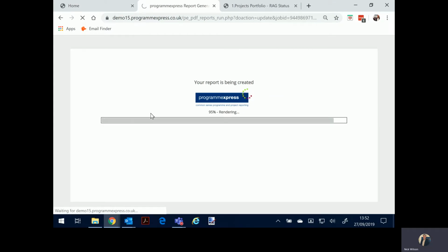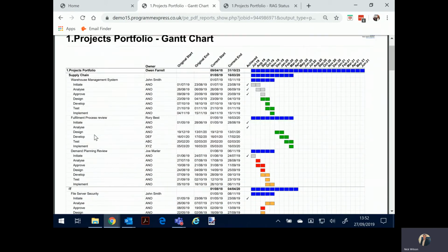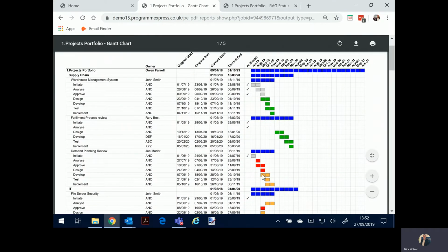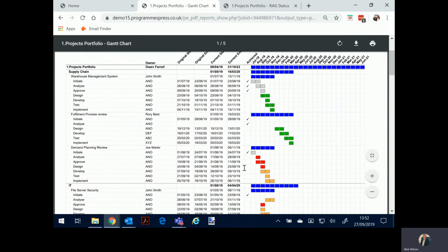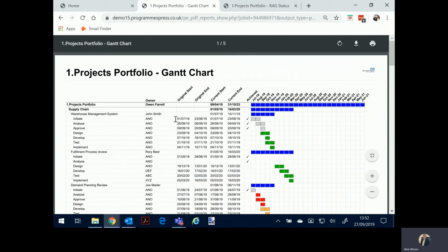So the plans, because we're running at portfolio level, are now visible for every single project within the whole portfolio. You'll see that we use the task bars, green, amber, red. Green on track, red means missed a key milestone, amber means forecasting to be later than expected. But one click and we can get everybody's plan of action.